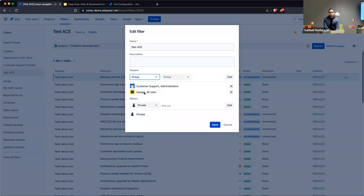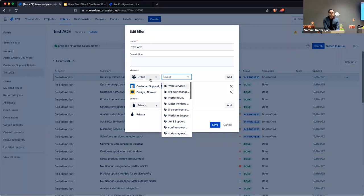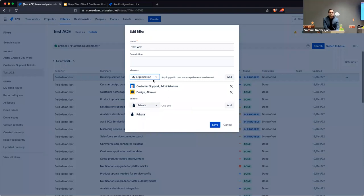You can also share this filter with a predefined group of users. The groups that appear in the dropdown are the groups you are a member of — this is probably by design to avoid inadvertently sharing data with teams you're not part of. You can choose to share with the entire organization, and selecting 'My Organization' means anyone authenticated into your Jira site will have access. And of course there's the default private option.